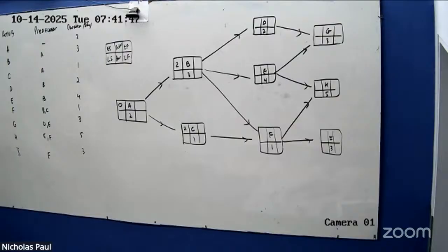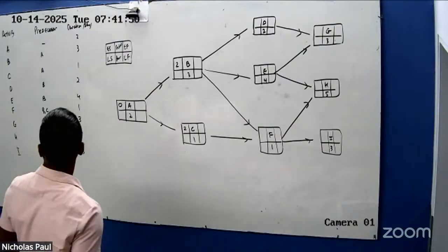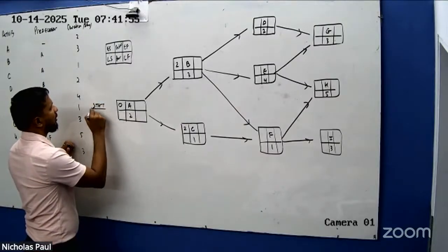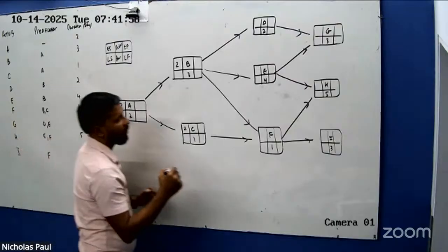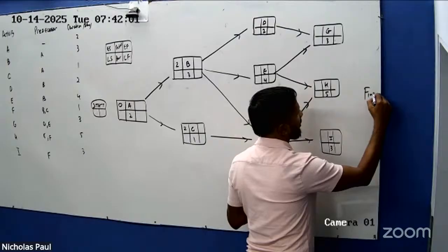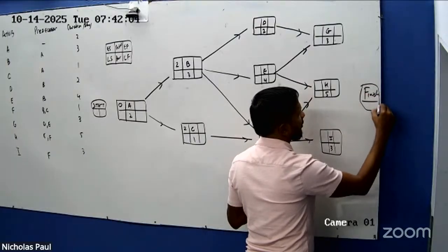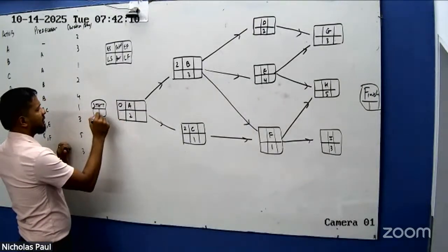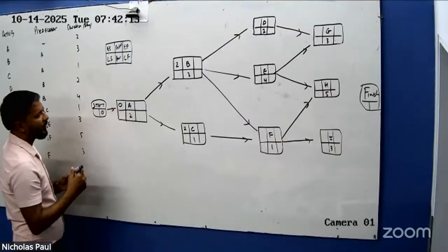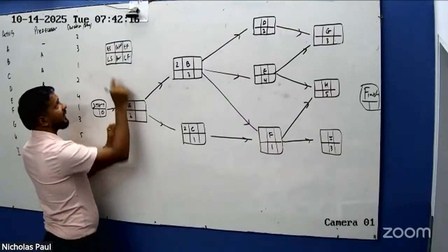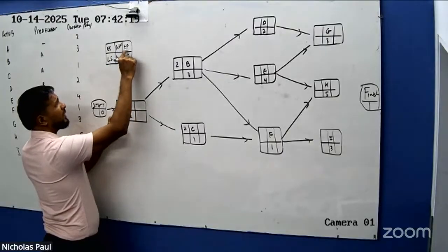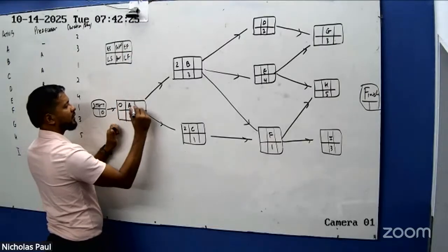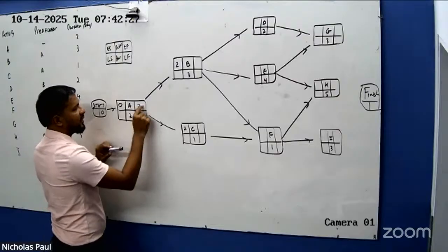Diane, I can go ahead. Yes, sir. All right, nice. So let's go. Of course, I'll leave out the start and the finish. So we could start here at 0 days. We know that for sure. The earliest time we could start A is 0 days. Now, what's the earliest we could finish A? Earliest finish, 0 plus 2 is 2. So that gives us the earliest A could finish.